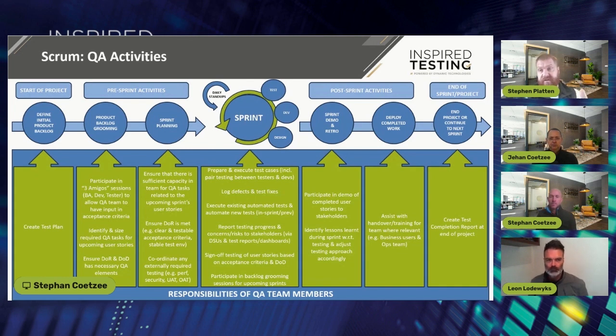But again, it's difficult because it's telling the product owner, I need to borrow everybody right now to look at this problem for an hour, even though the problem might take 20 minutes to fix, because it's a learning opportunity, and that learning opportunity will allow us to get faster and allow us to bring that 30% down. Yeah, that's obviously assuming that the team have an agreement in place that defects are fixed in sprint and not put back onto the backlog to prioritize.